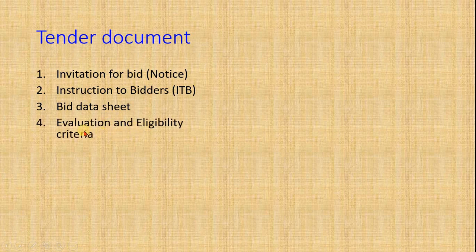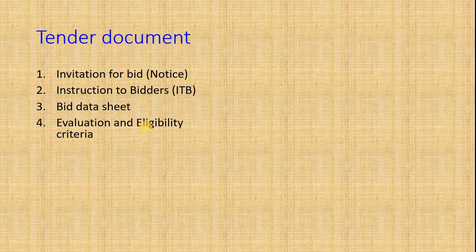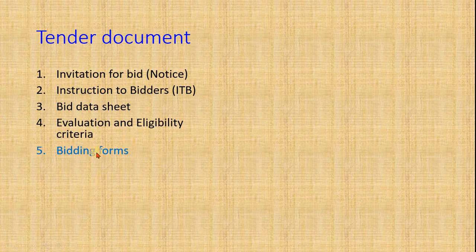Evaluation and Eligibility Criteria contains the criteria which must be fulfilled by the bidder to be eligible and evaluated for the bid. The evaluation criteria may include submission of a tax document, business registration form, registration, nationality, and whether the bidder has ever been declared ineligible by any government or UN agencies. Based on whether those criteria are fulfilled, who is eligible and how they are evaluated is defined in this document.